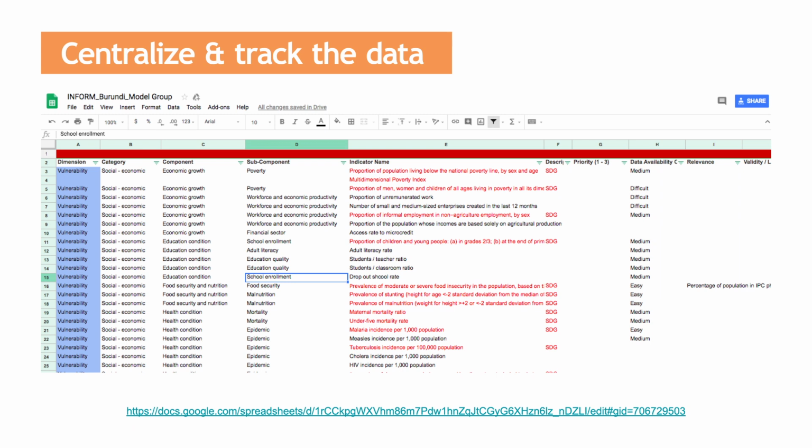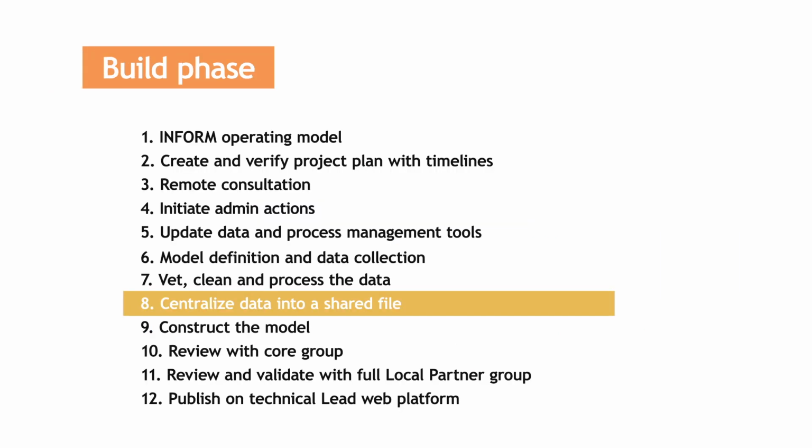Experience shows that many partners will attend the workshop, but may not readily share data in the follow-up period. Polite persistence usually helps surface and centralize all available data. Remember, INFORM never initiates a data collection process. Rather, existing datasets are centralized. INFORM is an aggregation of available data from other sources, never a primary data provider.